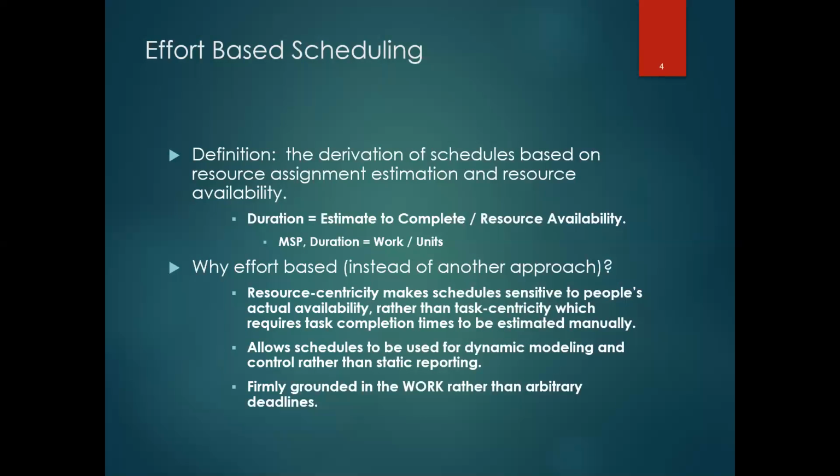One note, and I'll reiterate this, is Microsoft allows you to enter time or effort at the task level. And then as you add resources, it decrements that time. Open Workbench does not. Open Workbench requires an assignment level, and you'll find that that's extremely important whenever you're trying to do effort-based scheduling.